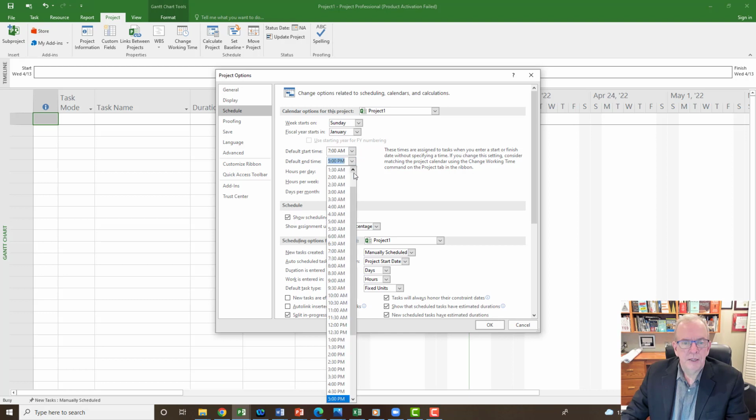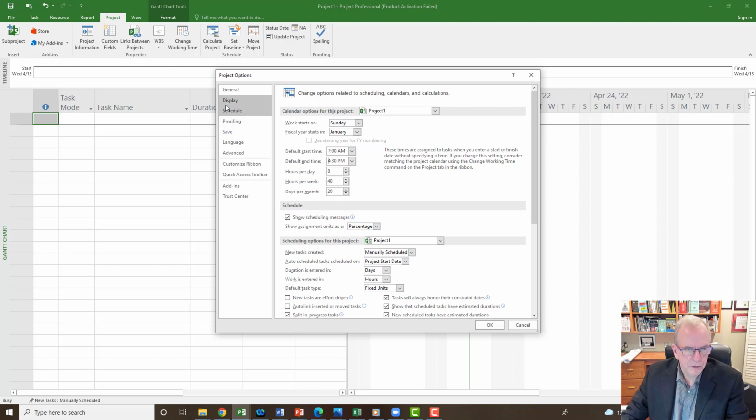And I'm going to make that, what did I have? I had 4:30 p.m., right? So I'm going to go down to 4:30 p.m. So I clicked on Schedule, don't forget that. And so hours per day, right? So I'm going to go in there and I'm going to type in 9.5 hours per day, right? And so 9.5 hours per day is how many hours per week? So we've got 9.5 and we're going to do it 5 days a week.